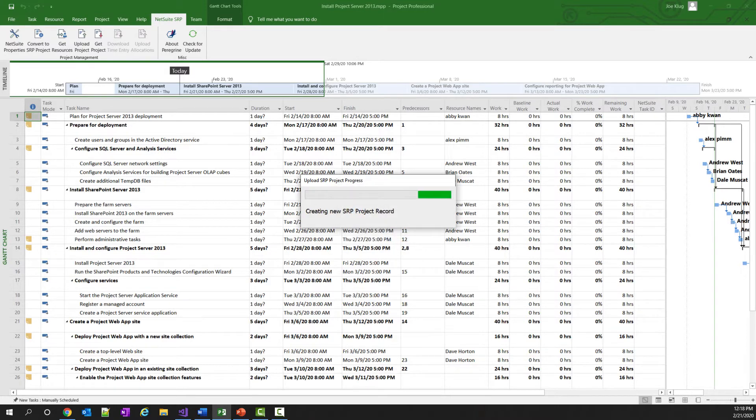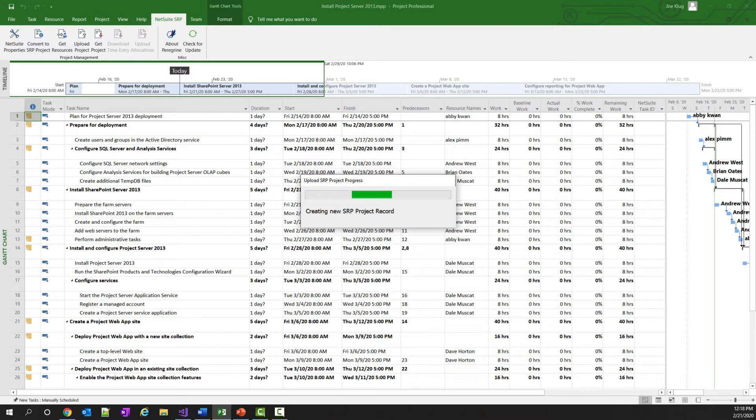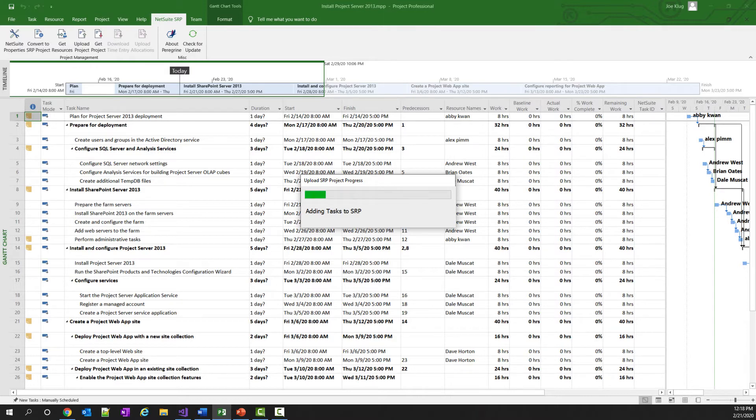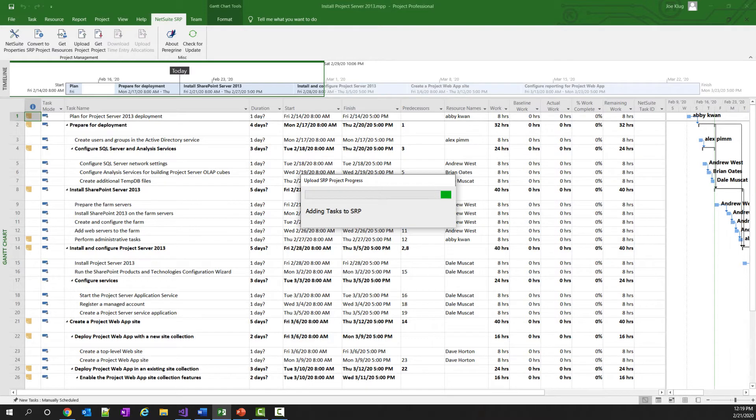When I click the OK button, the add-in will go and start creating the project record inside of NetSuite, and then add all the tasks to that project. Now this does take a few seconds to do because I have to add each task individually, and then it goes back and it reorders those tasks, and then it assigns all the predecessors to the task. So it's doing quite a bit of work, but the user doesn't have to do anything. It just has to sit back and wait for the project to be uploaded into NetSuite.